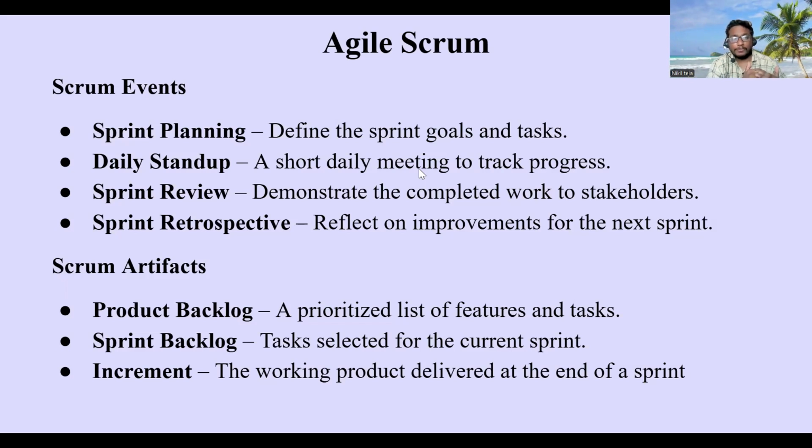So we will be prioritizing the sprint backlogs based on some prioritization techniques. The sprint backlog is nothing but the tasks selected for the particular sprint. In my first sprint, I will be completing 1 to 4 tasks or 1 to 4 features. In the second sprint, I will be completing around 5 to 8 tasks or 5 to 8 features. We can call them user stories too.